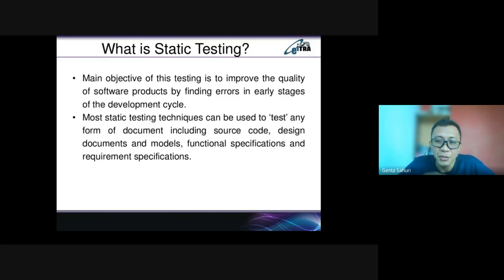For example, user requirements will produce some documents, one of them is the software requirement specifications, and others such as MOM, etc. Once it's done, you have to check everything regarding this document, and then all the stakeholders will approve. When it is approved, the team can continue to the next step. But when it's not approved yet, we cannot go to the next step.